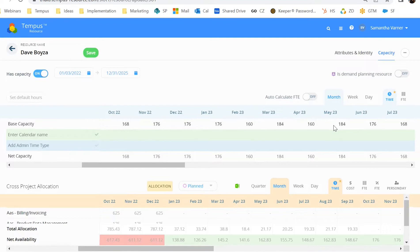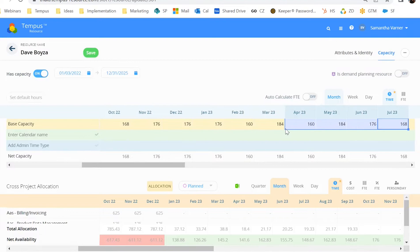Capacity is really important in Tempest. It really is the main driver for pretty much everything, including those very popular heat maps, and any reporting you want to do based on your allocation or plan versus capacity to understand if you can do the work or if the work is at risk. I recommend you make sure that you understand at your organization whether eight hours per day is a true capacity, or if it is seven and a half hours per day or 35 hours per week — that is all customizable.